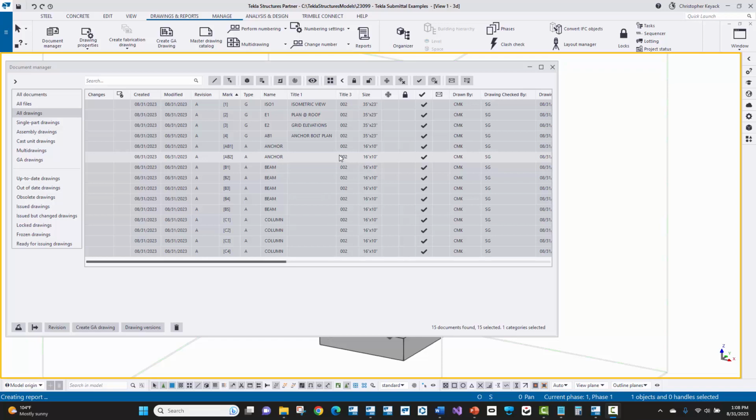Now, sometimes fabricators need to get a jump start on creating their parts and ordering certain materials, and so they may request that you create the single part drawings at approval, as well as export CNC files, which would then make this almost feel a little bit more like the process for releasing for fabrication, and I suggest you go take a look at that video for that sort of process and information. But typically in an approval release, we're just going to be focusing on erection drawings here, as well as our assembly shop drawings.